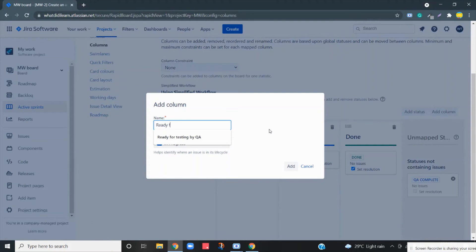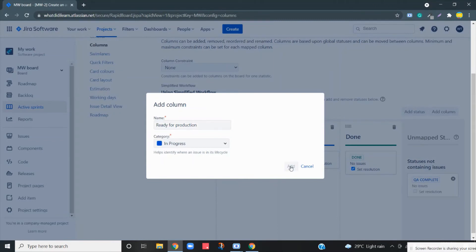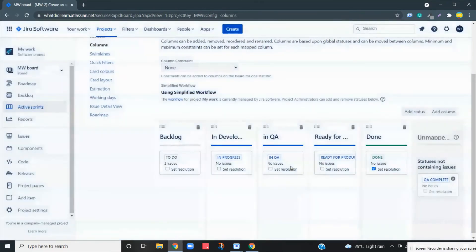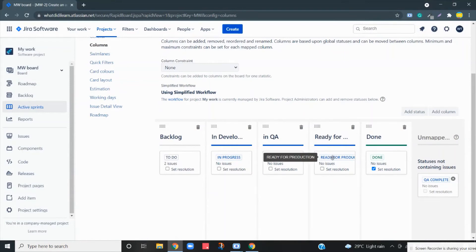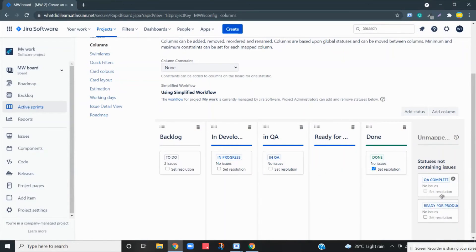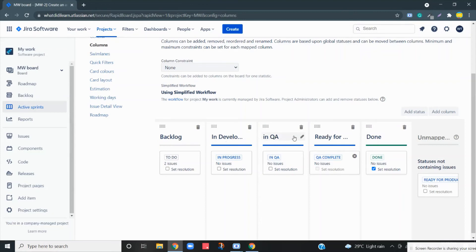Name it 'Ready for Production' — it means QA is complete and this is ready for production. This is the new column. Let me remove the existing status and add the 'QA Complete' status. Now if you see, you have five columns: To Do, In Development, In QA, Ready for Production, and Done.